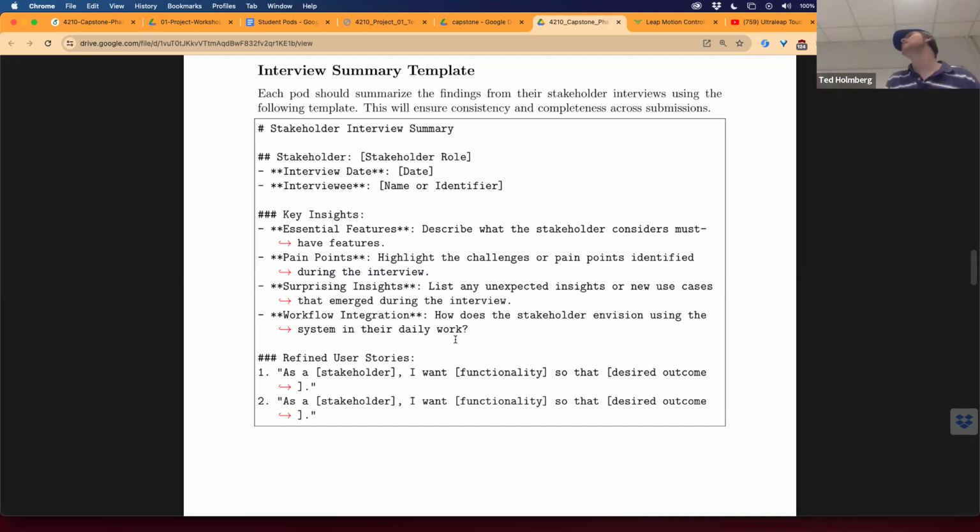Some tasks might be able to be accomplished in, say, an afternoon. Other tasks might take 2 weeks to do. So those should not weigh the same amount. So the pod that takes the task that's like 2 weeks worth of work should know that they don't have to take a lot more tasks, and they should be given the time to finish up on that. Whereas the one that takes something like an afternoon, like maybe just doing some documentation, should be expected to take tasks more rapidly. Does that make sense?